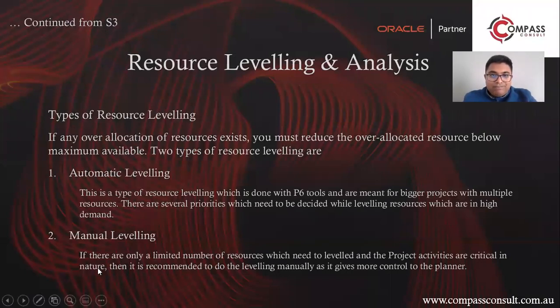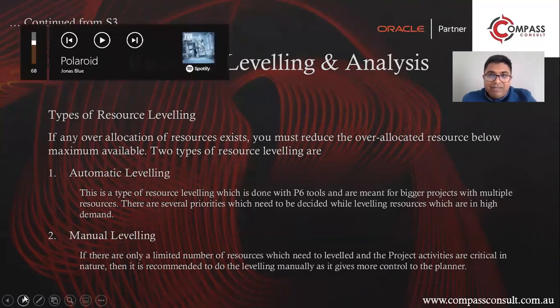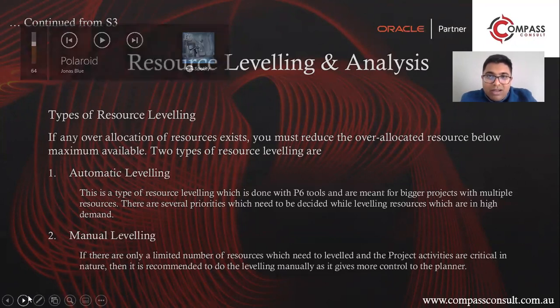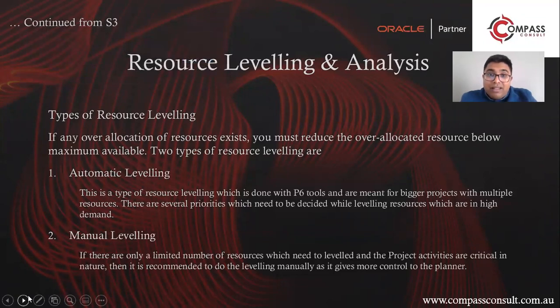All right, so that's all about resource leveling and analysis. Most of the time, I prefer only manual leveling because the activities are in logical order. You can't do automatic leveling. Automatic leveling would basically use your float and distribute your resources. It's a first level of work that a machine does, by using the float. And of course, it's up to you to decide if you need a minimum of 3 days or 1 week float. Even after the resources are leveled, you can do it in Primavera.